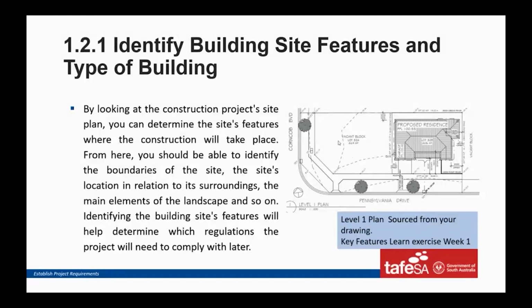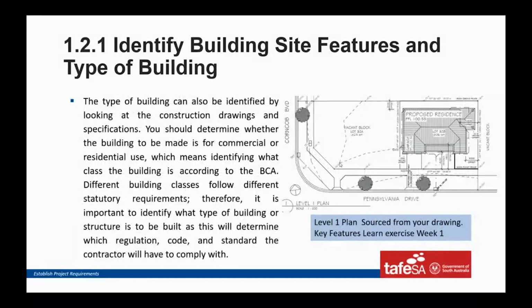And so we've got a couple of really interesting aspects in here, and the other interesting thing while we're on this plan, have a look over here. This is where the electricity pole is situated for this block of land. There's no pole here, it's way up here. So does that affect what you allow for in your underground electric service? I think it is.